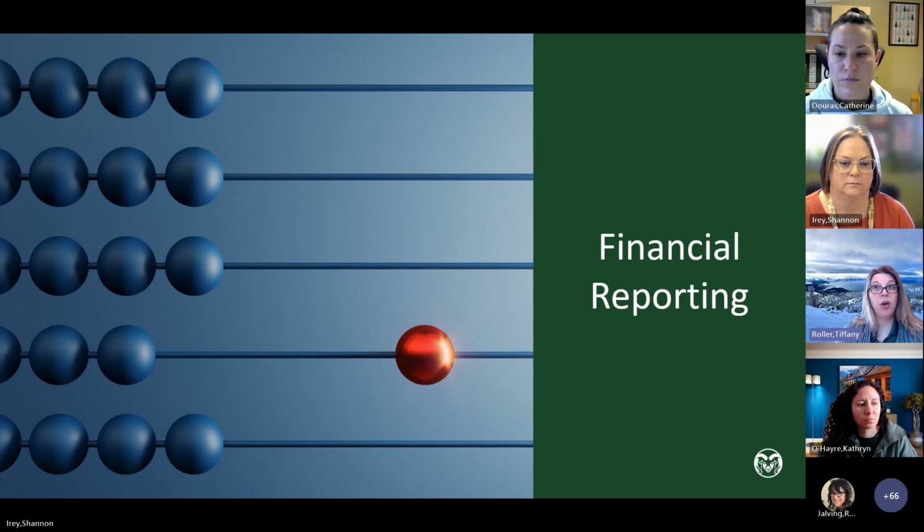Most federal agencies have a 120-day closeout period for any final expenses that are coming through. There shouldn't be final expenses after the end of the period of performance, by the way, but this covers anything lagging in that queue, and any final questions that we need to field to get everything squared away.